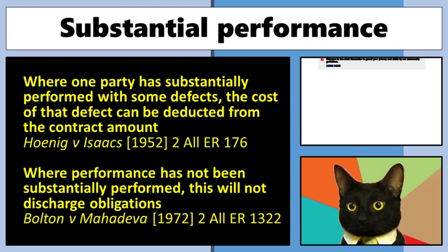If they've said to you, "Oh, I can't get it from our supplier. It won't be another six months." You say, "Okay, all right. So you can't do the job. I'll get someone else to finish it." That's okay. If you're in a situation, and again, I'll talk about these rules of repudiation, where they've clearly demonstrated that they're either unwilling or unable to perform, or they reckon that they've finished it. No, there's nothing wrong with it. And you're like, yeah, there is.